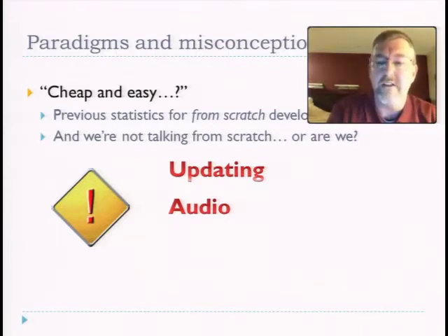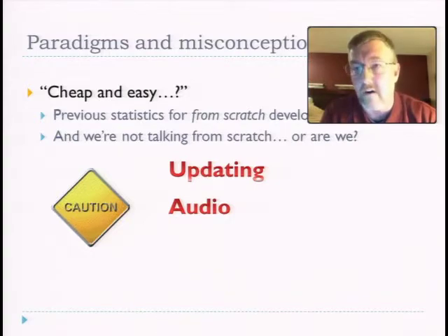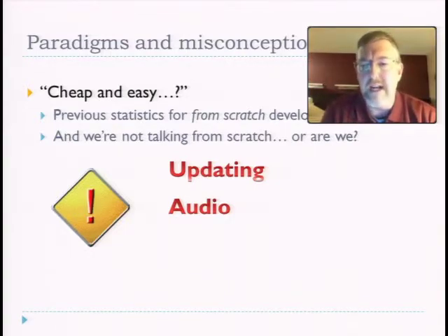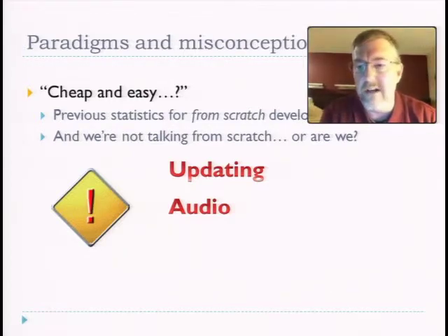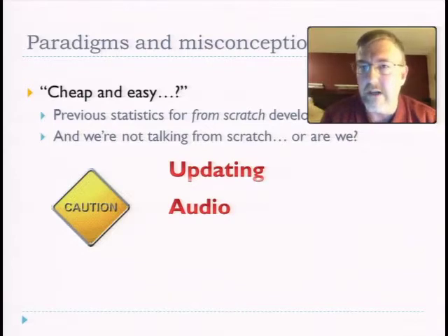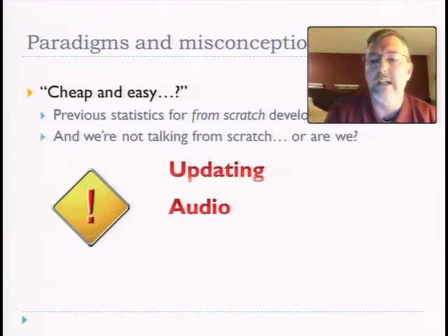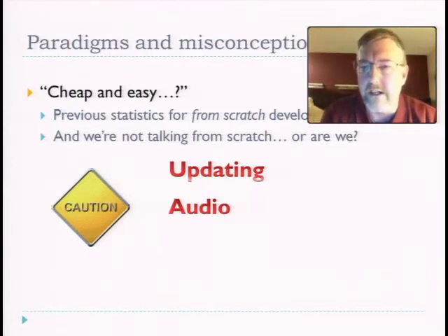Given these kinds of times and dollar amounts, is this update that you're saying needs to be in the course an absolute need to do, or is that an absolute nice to do? And maybe the nice to do needs to wait until we get it actually out there on the web, and then we'll do the nice to do's maybe in a version 1.1 where it wouldn't be as lengthy and as costly to do, and we'd at least meet the schedule of getting the course out on the web.